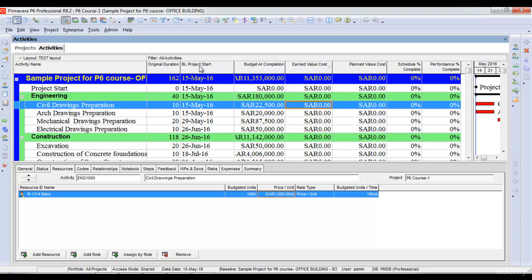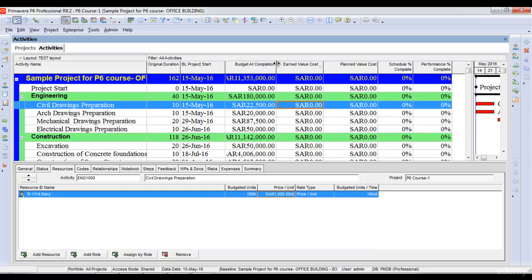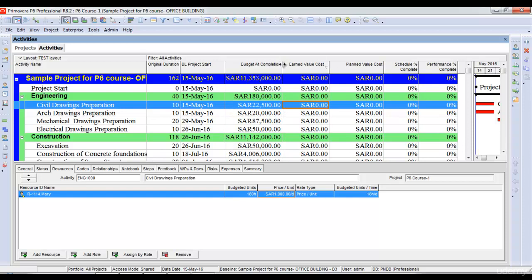Schedule percentage complete depends upon the baseline start of an activity. When we assign a baseline and no progress is yet recorded, your schedule percentage complete should be zero and your performance percentage complete should be zero as well. Once the project progresses, you can compare schedule percentage complete and performance percentage complete — if these two are the same, the project is on time; if different, the project is either ahead of schedule or behind schedule.